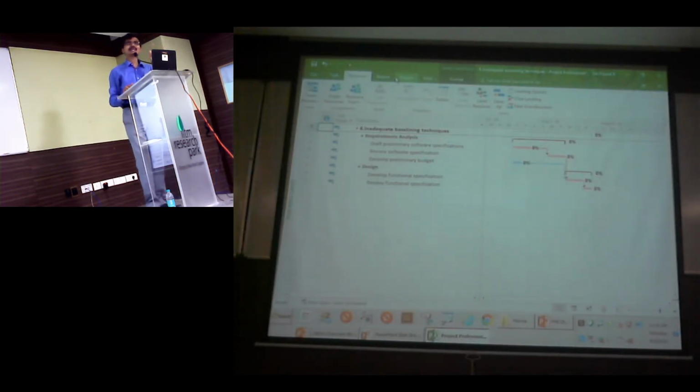The project is having 11 baselines. Of the 11, remember, the one that is without number is your latest baseline. Baseline 1 to baseline 10, which we'll see next, is only for your reference purpose, backups. But people who may not have this knowledge think first baseline is baseline 1, second baseline 2. After 10 baselines, they don't know what to do. Now the drawback of using 1 to 10 is it is not going to be used by Project to report deviation. To report deviation, you always need to set your latest baseline in baseline without any number.